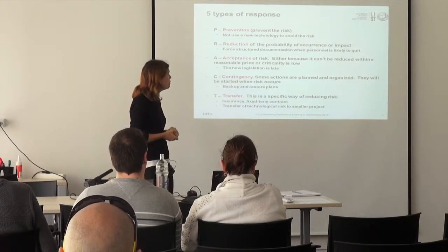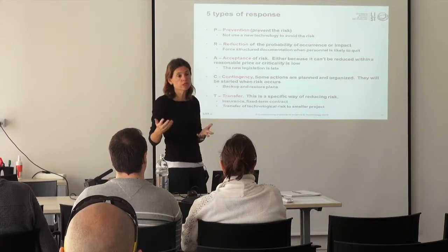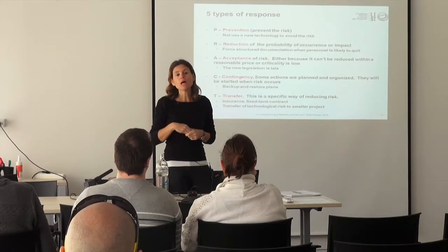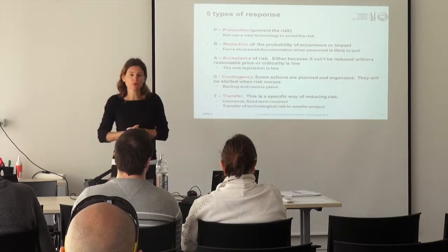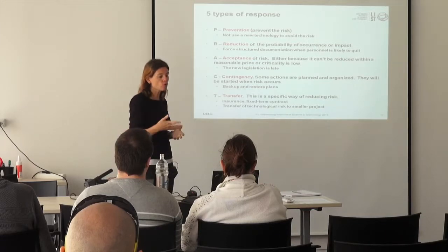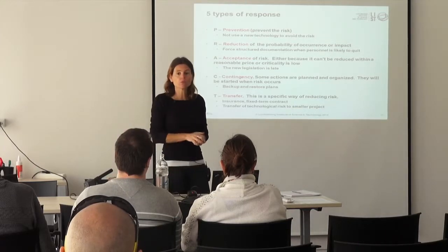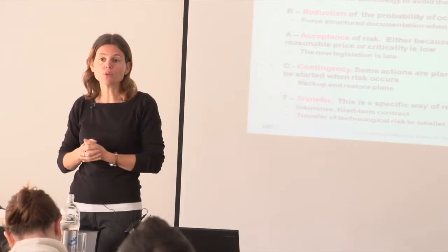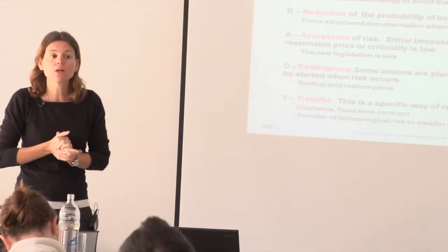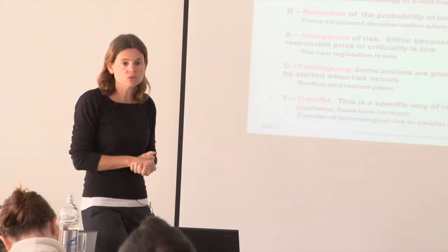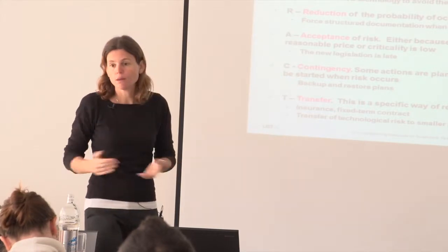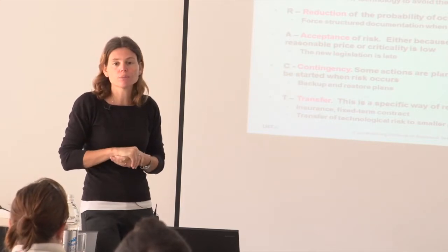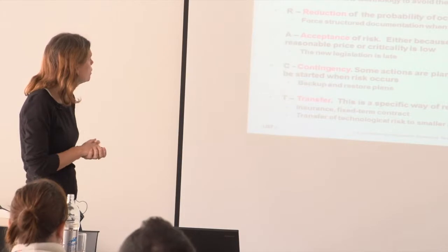So, for example, if there is somebody in your team who has not been happy for many months now, and is looking for a job somewhere else, then if you force them to have a backup working with that person, or if you force that person to have a clear documentation of whatever they are doing, then maybe it's a way to reduce the risk of being left with no documentation and no idea of what that person was doing if he leaves.